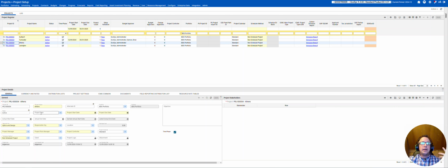So in other words, parameter stickiness and sharing starts with the save mode. That mode is both about: am I open to receiving a value for my parameter from a session context, and also am I open to sharing my value for this thing to session context? That's the sharing part, which I think is forgotten, or maybe I don't know. I'm theorizing.